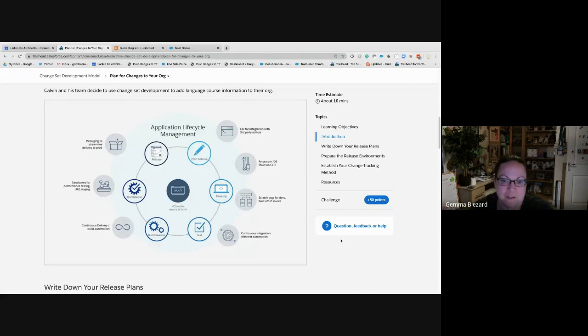And then you get together as a team and you have a product manager who decides how important each of those stories is. Is it fundamental for someone to use the system, and do we want to deliver it in the next 2 weeks? Yes or no? And once that priority has been decided, sorry, crash course in Agile here. Once that priority has been decided, the team itself can add it to the backlog for what's called a sprint, which is like a 2 to 3 week period, very time boxed, which is the period in which stuff gets built. And they work their way systematically through that list of stories in priority order. And then at the end of that 2 weeks, that's what the customer gets. So those 2 methods are used to plan releases and to build.